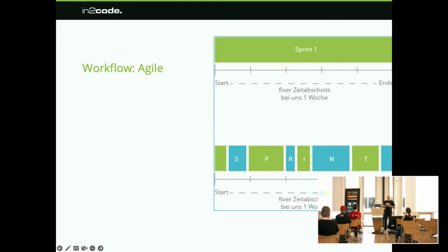We came back into a workflow that paid off. We try to use a lot of parts of the toolset from Scrum, like having a planning meeting where the developers draw the tickets that fit best to their skills and maybe also best to what they like to do.